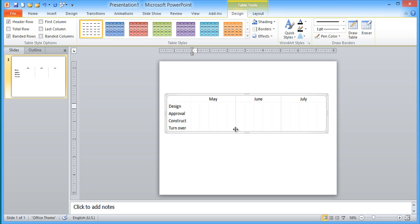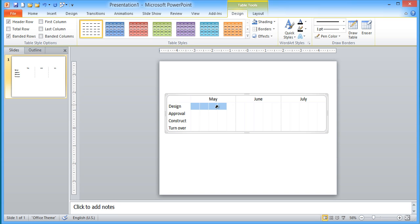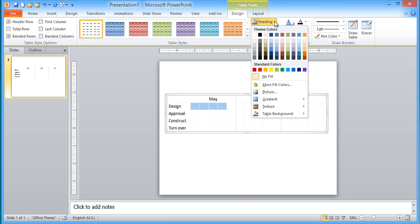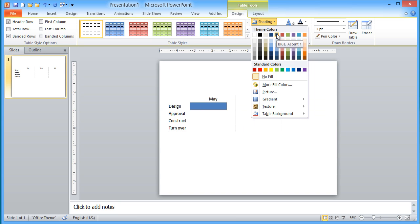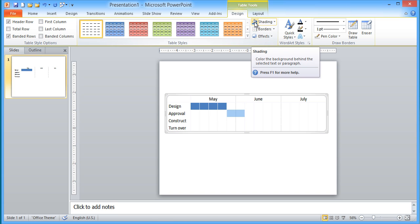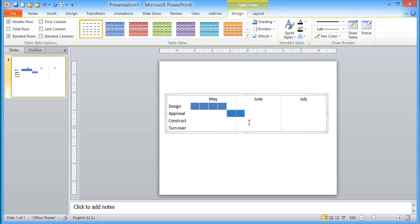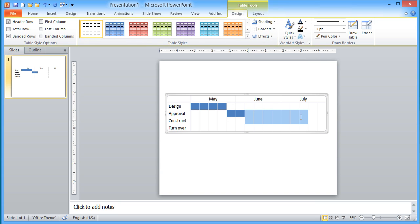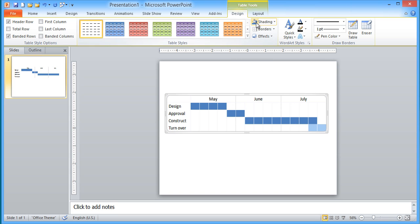So now once I've done that, I can start to say, when do these tasks happen? So let's say May, the first four weeks is the design task. So I select those cells and then I give them a shading. So I might pick my default blue here. And then the approval takes a couple of weeks after we've done the design. Shade that. The construction takes most of the time. Shade that. And then our turnover actually has an overlap with the construction because we can start turning stuff over as soon as it's done. And shade that.